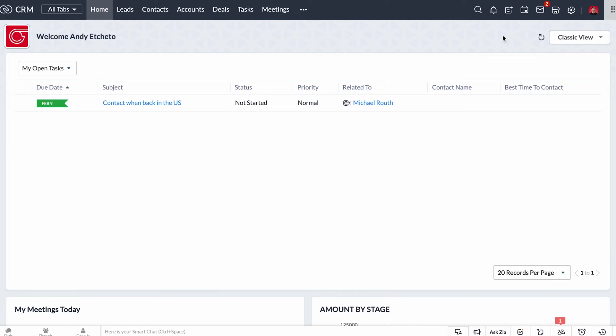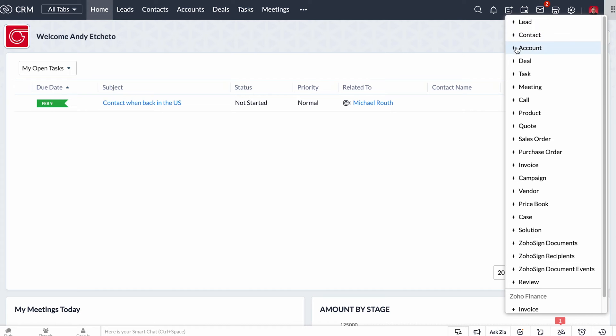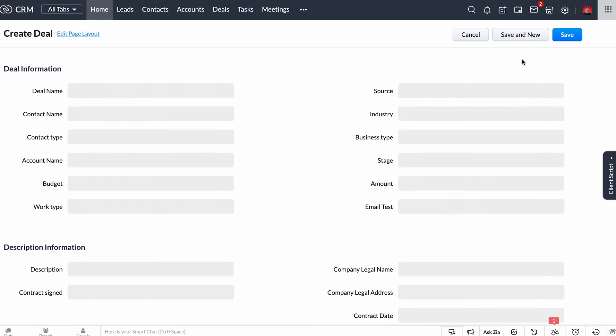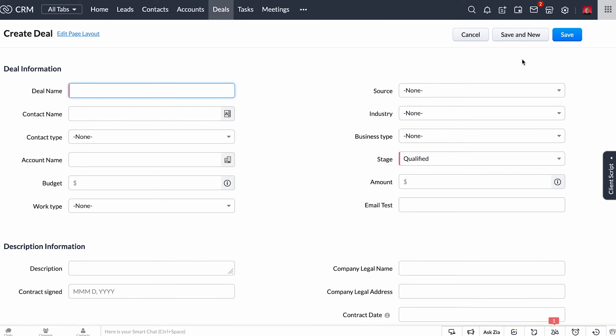I would try to schedule this import on a weekend and launch the app on Monday. This way, if something goes wrong while importing the data, you can postpone the launch date and it won't affect the users. If you don't have any data to import, you could ask some users to add some records to the new system before launching it. This way, once the rest of the users open the new app, there will be some data in there, which will make it easier for them to understand the new app.